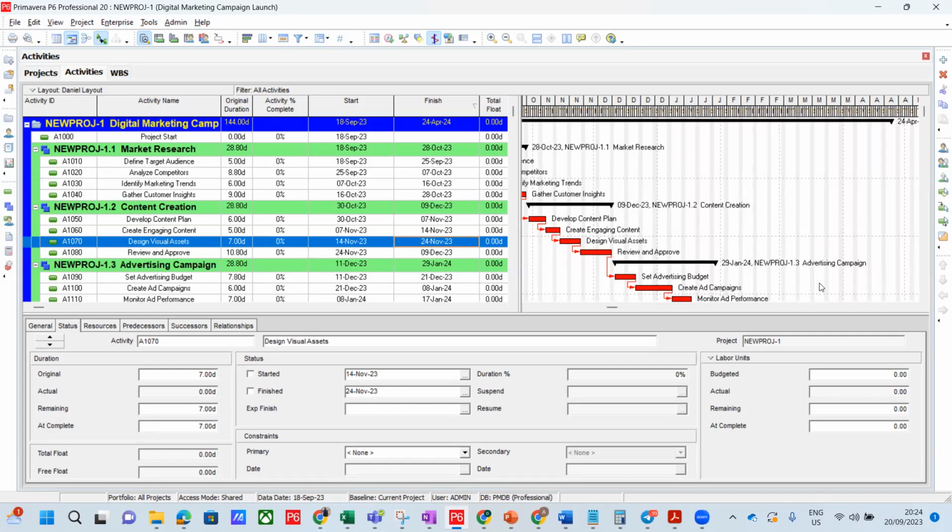So that is lag. I'll quickly say it. So lag and lead. In Primavera, they call them lag and lead. So lag means positive allowance, like say buffer, allowance between two activities, right? That is lag. Lead means negative buffer. It's not positive, it's negative. Lag is a positive side, but lead is when you minus some days from in between.